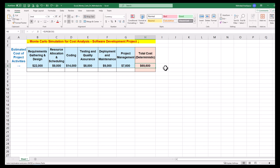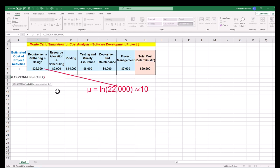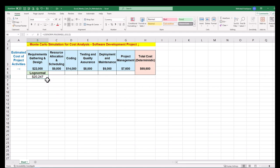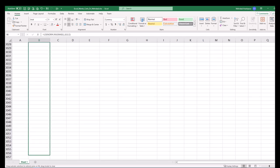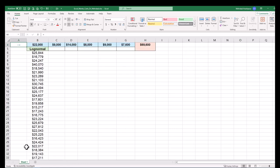The first activity of requirements gathering and design has an estimated cost of $22,000. Our previous projects show that there is probability and randomness around this activity. The best fitting distribution is logNormal. We generate random inputs using the logNormal inverse function with two variables mu and sigma. The mean value is almost 10, and a small sigma such as 0.2 ensures concentration of random values around the mean. Click and drag down to generate 5000 random numbers. Use Ctrl+Up or Ctrl+Down arrows to navigate this large spreadsheet.